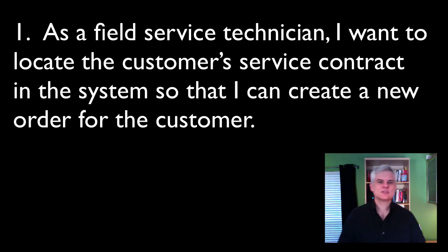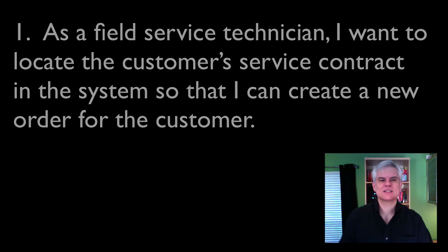All right. So a user story is just a simple description of a scenario for the purpose of scoping out the work that's required to build the functionality to support the given scenario. It's the basis for further conversation and requirements gathering. Based on this most basic explanation, the project manager would ask the developers how long they think it would take to build this functionality into the system.